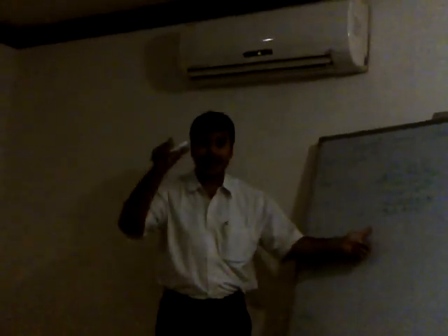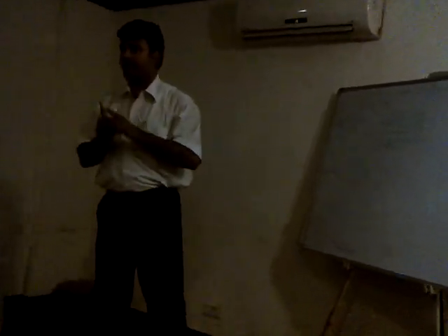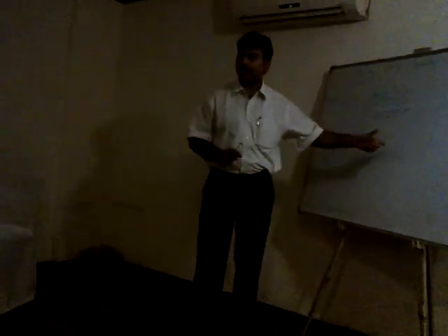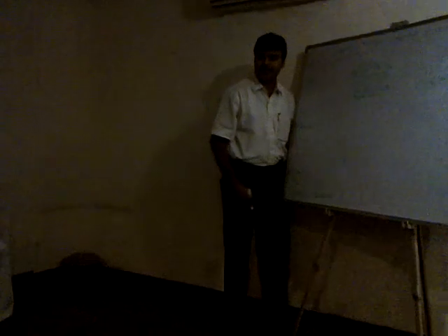Right. And so then what happens? Then you had define activities. Now in order to define activities, what is the starting point? It is the work package, because the work package is the lowest level deliverable. So we need to define the actionable items which we need to perform in order to reach that lowest level deliverable. So in order to define activities, what were the inputs apart from the schedule management plan?